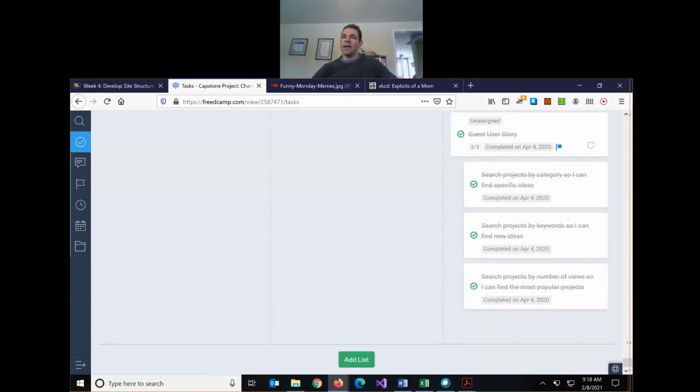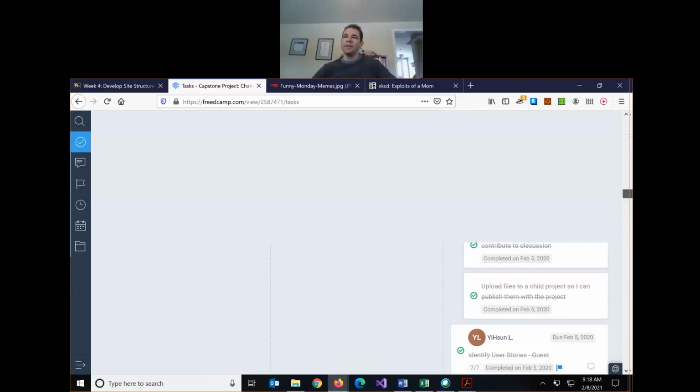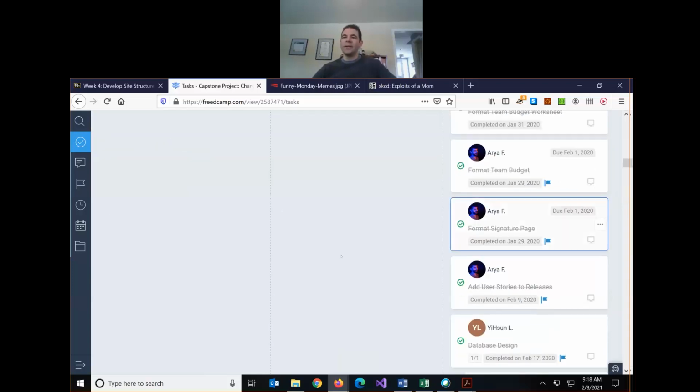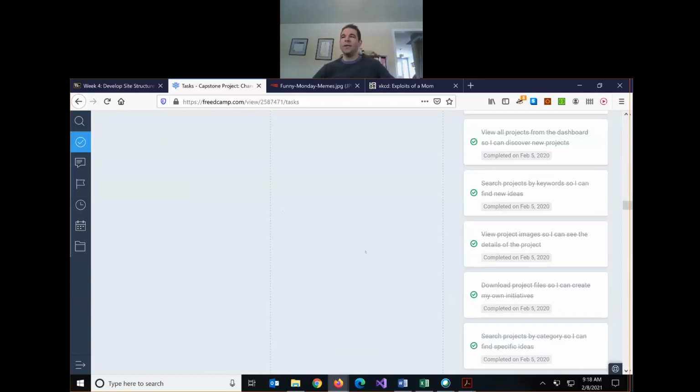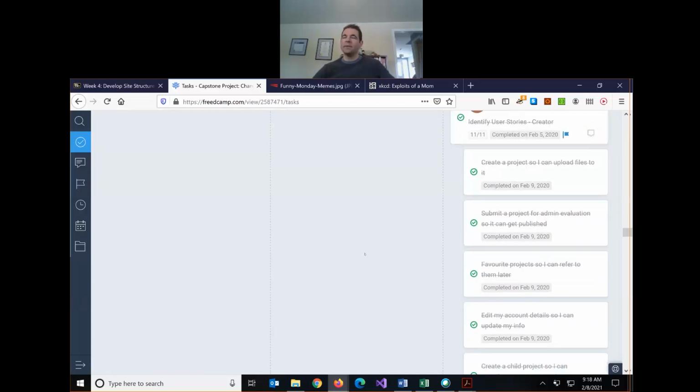So the idea behind the assignment is that in 2 weeks, when you submit this, you will have broken down and prioritized all of the individual things that your team will need to do over the next 2.5 months to finish the project. So we plan it out, we divide it, we figure out what we need to do, who's doing what, in what order, what the priorities are, and when things are due. We want to have all that organization and planning done before we really start doing the design and code work. That way we have a good plan to work from. And like I said, we'll use FreeCamp collaboratively today in class to do a sample project.